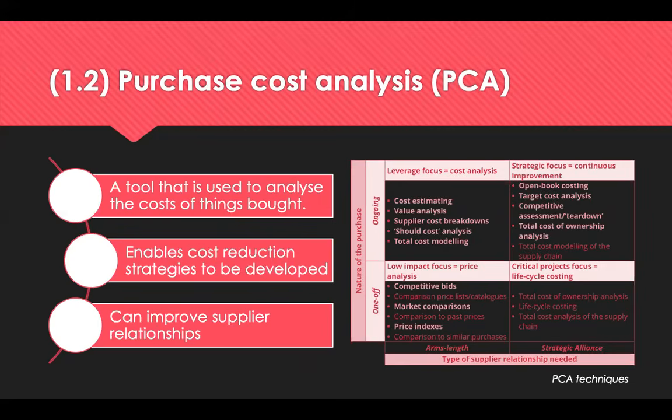The three sources of price comparators are prices that you've paid in the past, so long as those prices are adjusted to account for inflation or deflation. You've got published prices such as those found in catalogues, or using a price formula. So the cost to build an office would be benchmarked at a certain price per square metre.